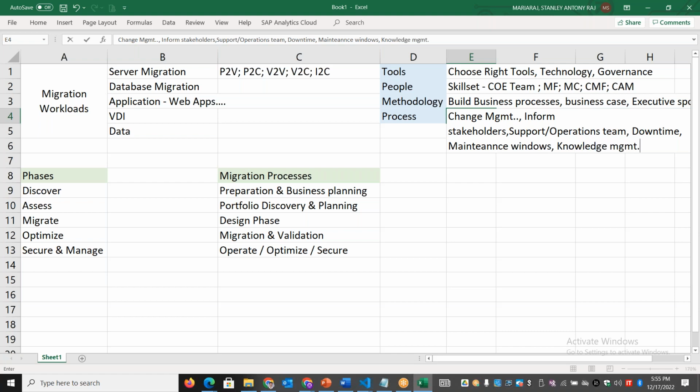So what are we going to do, whether we have already done this migration in the test environment and development environment, based on which the change management team will look at that and approve it. As part of this, we also need to create an SOP or a lessons learned document, a KB article. We need to identify the different risks involved and put them into the risk register and issue register. So we have a lot of things surrounding the migration. When you talk about migration, it's not just about migration, right? We need to have all these things put together, and sometimes you also have to provide justification on why we are planning to migrate.